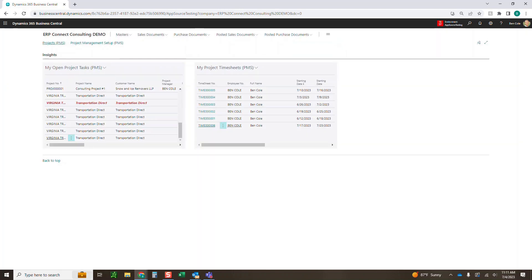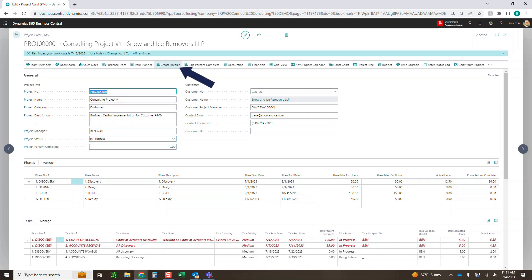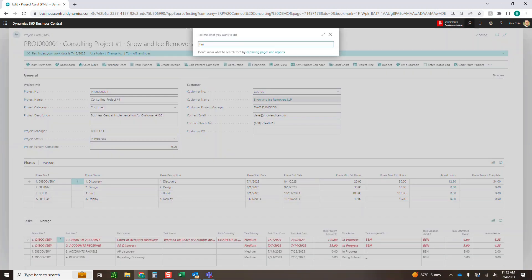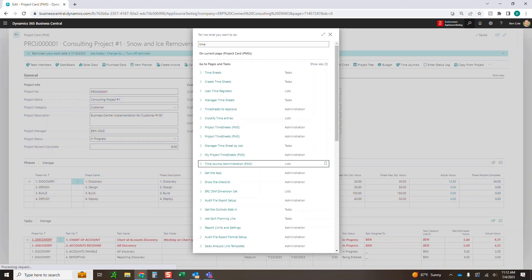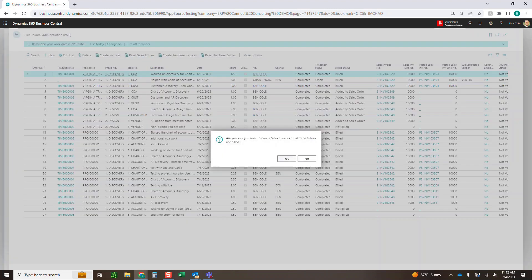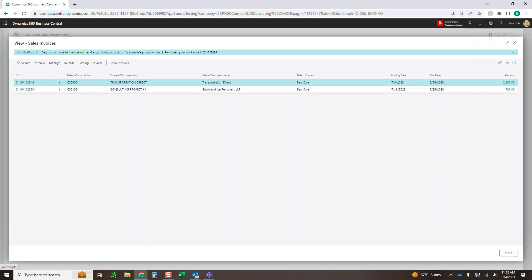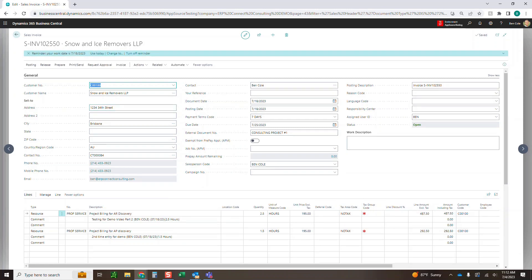There are two ways to add time to an invoice. First, I can come into the project itself and just click Create Invoice — that creates the invoice directly off this project, great for a project manager who needs to get it out quickly. If you're more of an administrator, you can use Time Journal Administration, which gives you every time entry in your system and lets you bill them all at once across multiple projects. It will create different invoices for different projects. If I click Create Invoices at the top and confirm, it creates all the invoices for all the time that was out there. For this project, it created two invoices — 2.5 and 1.5 hours, which are the time entries we just entered.